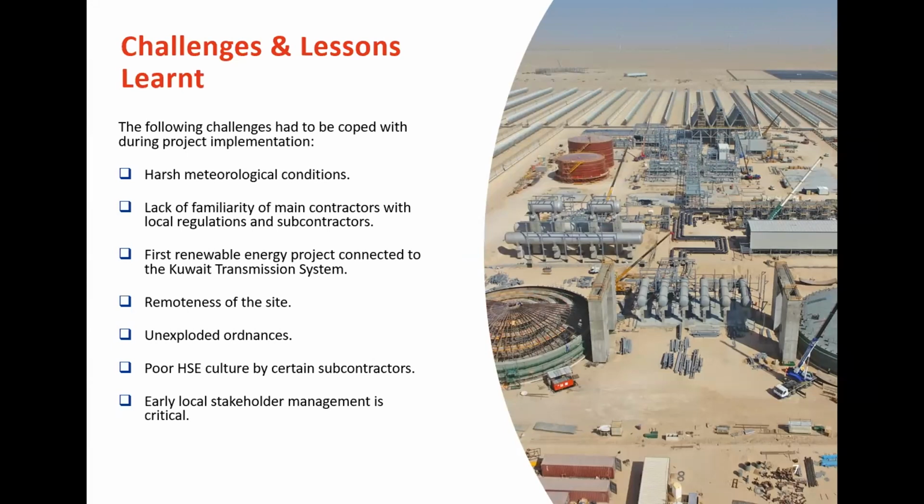And another important aspect was the import of equipment and material. At some points there was a significant congestion in the ports and in the local port, and it was really very difficult for the contractors to make sure that the equipment and material was arriving to the site in time, and this is also something that the EPC and DBO contractors had to put a lot of effort into to make sure that this was not impacting the project. Okay, and particularly the execution schedule.